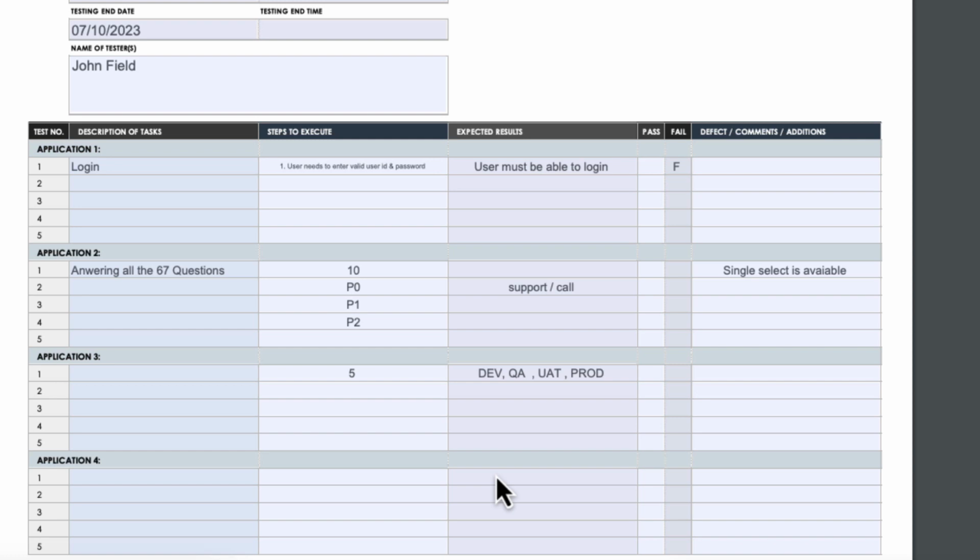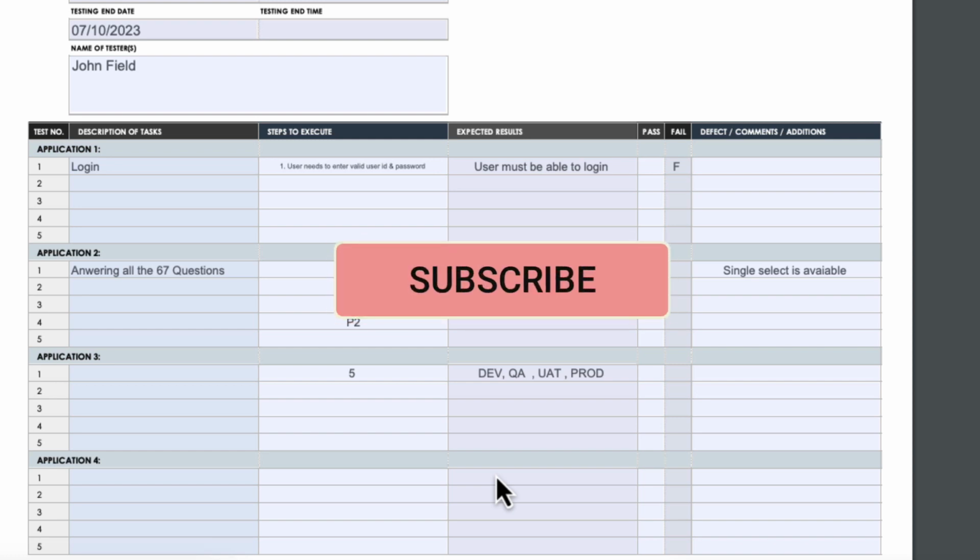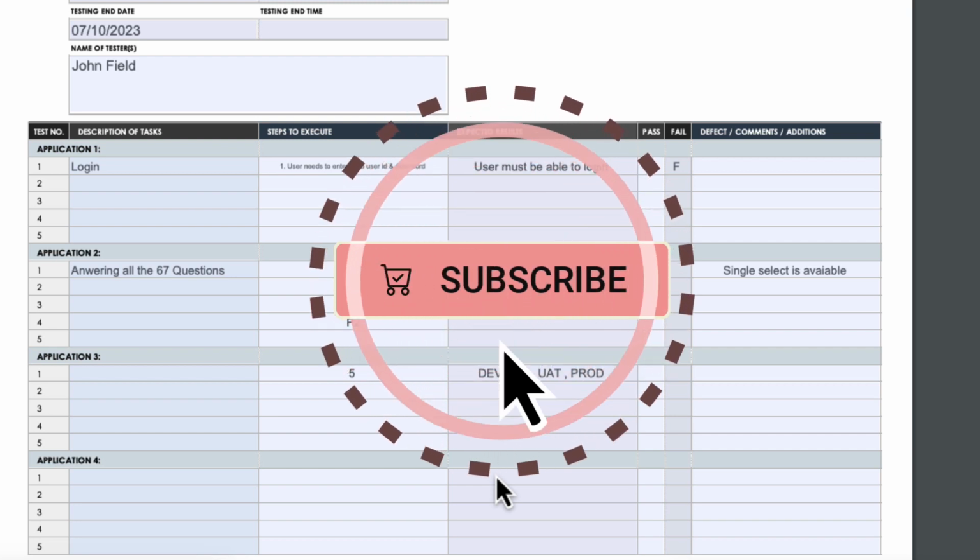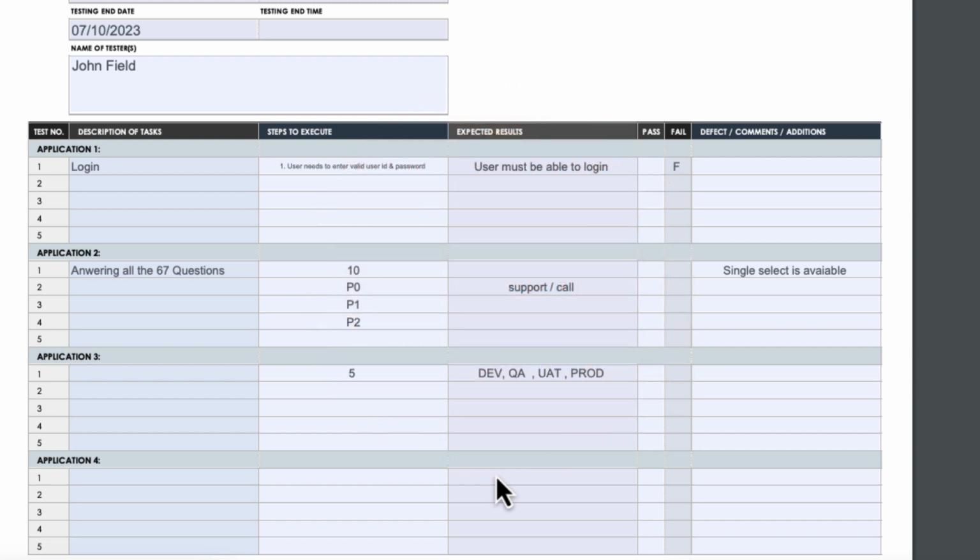What you have to do is know basic SQL, understand how to get the dummy information first of all, and share it with the business owners. If the business owners are very old and don't know how to log in or test each and every scenario, you really have to do a demo for them and make sure they answer all the questions and the complete sheet. It needs to be filled as pass without any defects, and then they have to provide you approval. That's when you get the UAT approval. Once we get the UAT approval, the product can go for live production. So this is user acceptance testing.